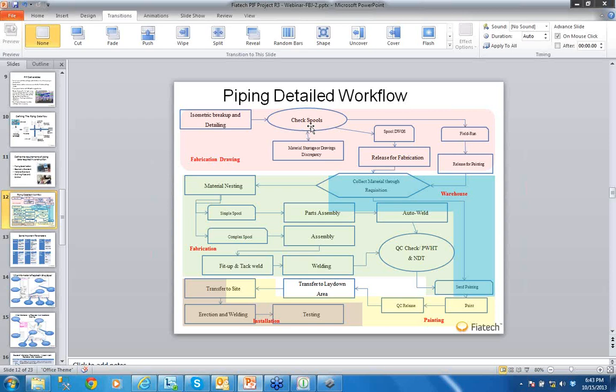We can check them based on the grouping. Like in this ISO, how many linear meters of pipe I have, I compare it with what I have in my detailed drawing. However, the weld data and the remaining data, normally this is looked at by what we call piping checkers, who ensure that this kind of data is done. But normally, we do this at the beginning of the process to ensure that all the hiccups are taken care of. Later on, it will be just random checks, because whenever the flow starts working correctly, the amount of error is minimized.